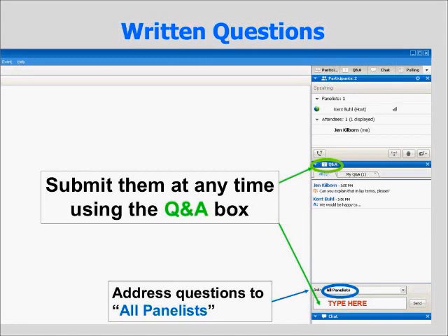James asks, when you say substantial rehab, does that only pertain to large buildings, or does that also include individual houses? That's a good question. This is relevant when you're talking about what level of review you have to do. Do I have to do the full environmental assessment, the NEPA assessment, or do I just have to do a statutory checklist, which are those maybe 18 separate laws and authorities, what we call a statutory checklist, or we might call it Part A of the entire NEPA form.